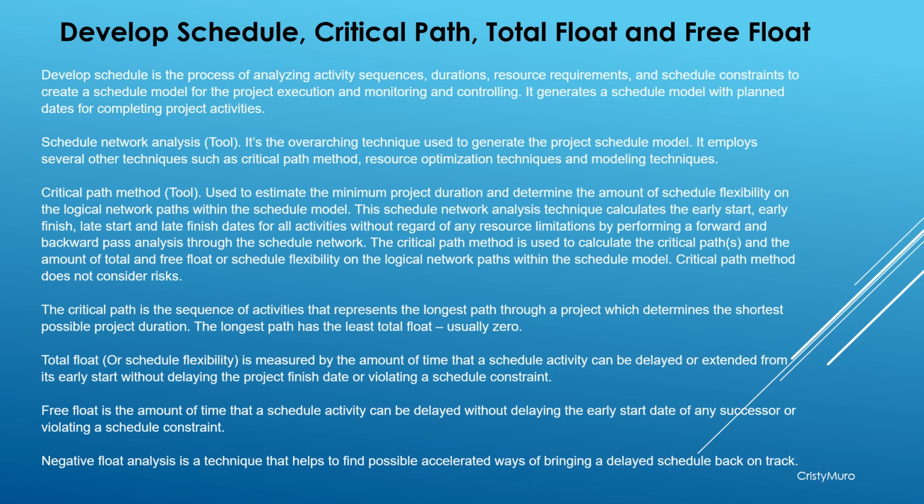Total float. The total float or schedule flexibility is measured by the amount of time that a scheduled activity can be delayed or extended from its early start without delaying the project finish date or violating a schedule constraint.